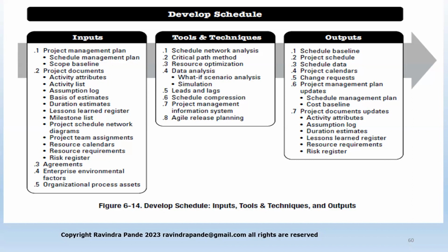Normally, as a thumb rule, PMI PMP suggests 6 hours of task planning each day, and the rest of the 2 hours are for meetings, documentation, and other things. But some organizations, even in North America and Canada, might plan for 6.5 or 7 hours a day.